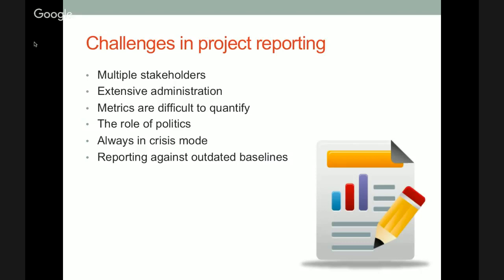And this is explained away in project management methodology as the cone of uncertainty, right? You don't know what's going to happen in the project until you get through the project. So you're really just estimating at the beginning. So you're always going to have reds. We have to figure out how to deal with that because it is going to happen. You're not going to know everything from day one, but how do you adjust your reporting accordingly?